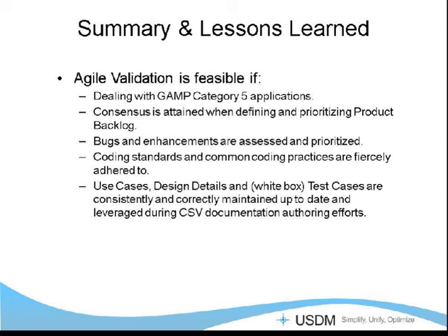So some of the things that could help, right, are making sure that coming out of any testing, the bugs and any enhancements that are requested are prioritized by the business, to make sure that we were only going to deliver what absolutely needed to be delivered in that first deployment.